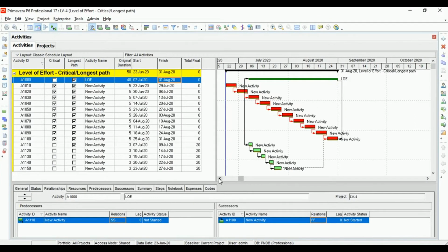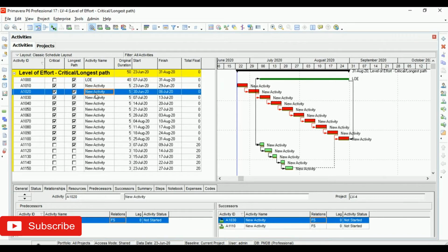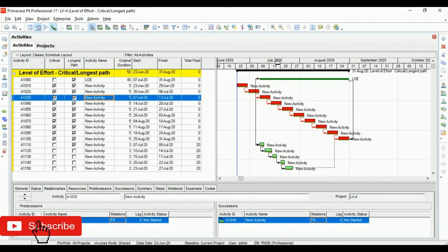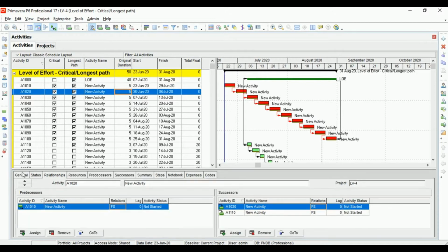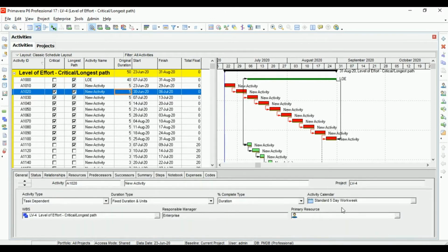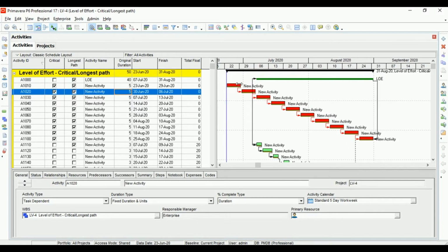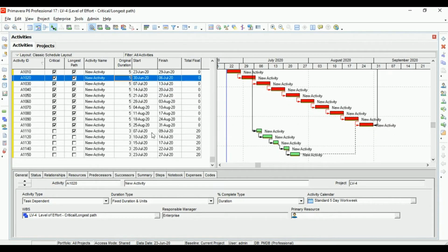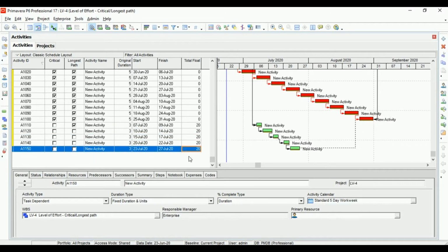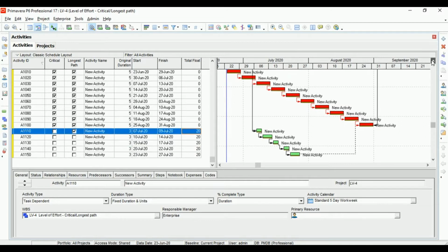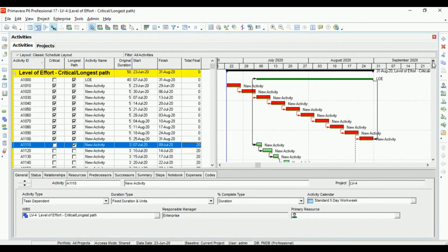If you take a look at this, I created the same type of activity, gave the same relationships, but in this case I gave activities of 5-day duration, and these activities have a calendar of 5 working days. They are linked to each other as finish start relationship, similar to the question. And then here at the bottom we have a couple of activities which have some positive floats. In his case he had 3 days of float, we have positive 20 days of float. I guess that's not a problem since we're just trying to represent what he was saying.